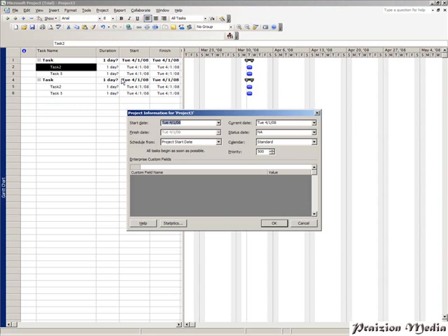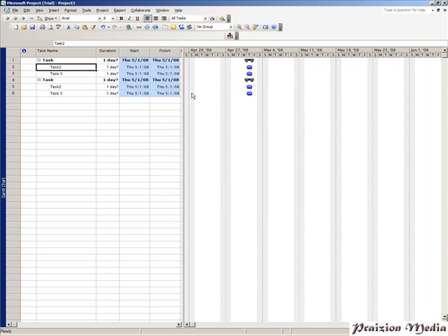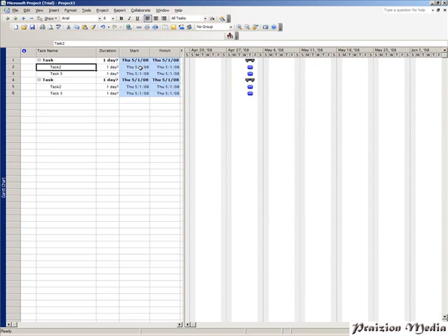After you do that, you need to click on the drop down arrow next to the start date and you need to select 1st of May there. The moment you click OK, you notice that your whole project schedule has been updated to the 1st of May. That is one of the big best practices in using Microsoft Project. Never forcefully type in the start date.